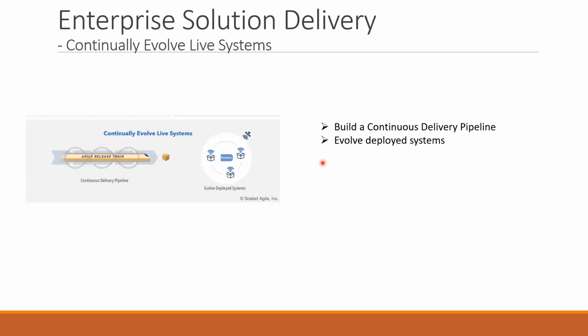One more point: whenever we are talking about WIP, what we are applying is limiting the work in progress, the WIP limit. So definitely you can use it in your Scrum and Kanban. This is just a practice of restricting your multitasking so that you can go for a finished-first approach. Pick one, complete it, then start the next one.